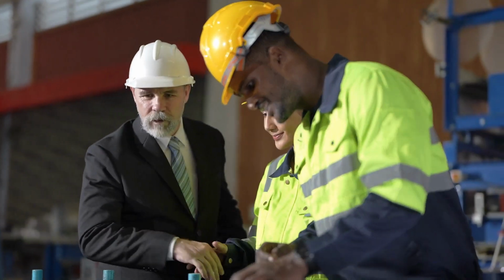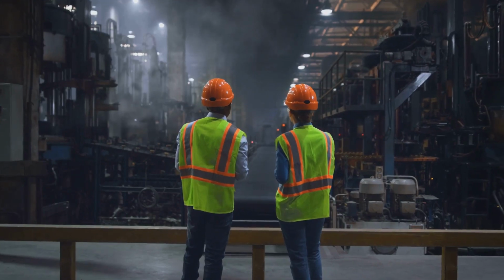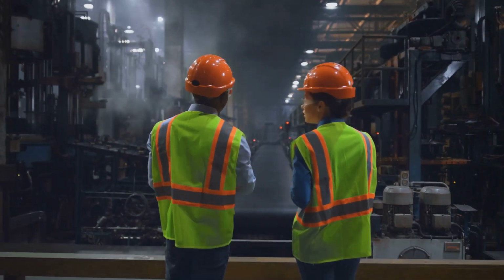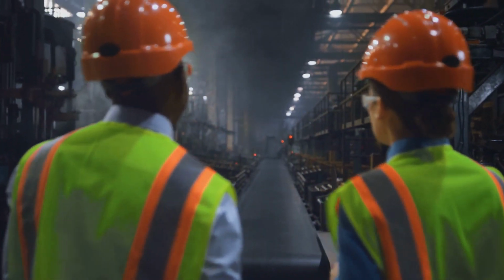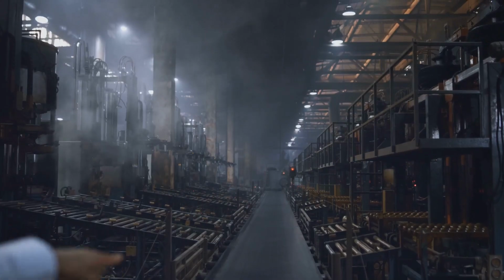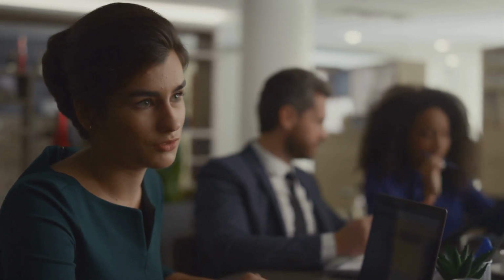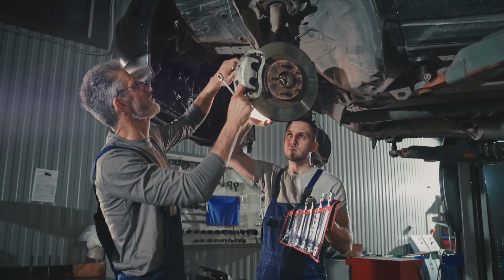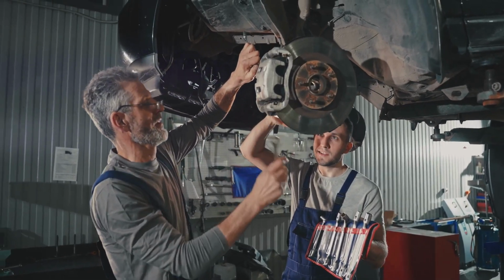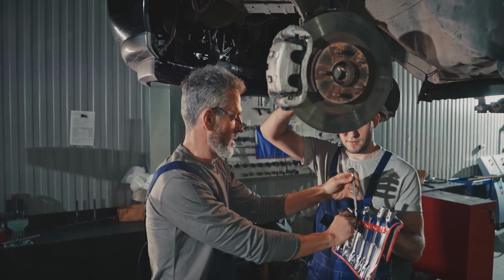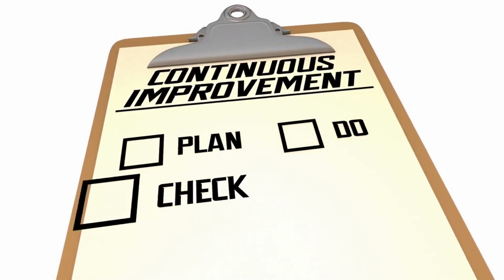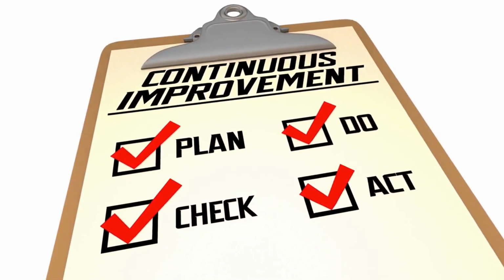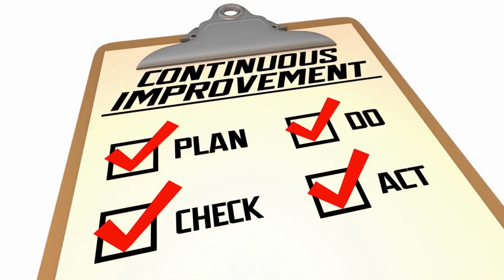First, identify the system's constraint. Then, exploit it. Get the most from the existing capacity by making sure there's no downtime and that priorities are clear. Next, subordinate everything else to the constraint, meaning you pace all non-constraints to feed it smoothly. After that, elevate the constraint. This might mean adding capacity, investing, or even redesigning parts of your process. And finally, repeat the process, because once you break a bottleneck, you'll usually find that another one will surface.